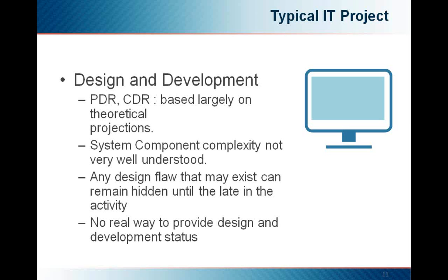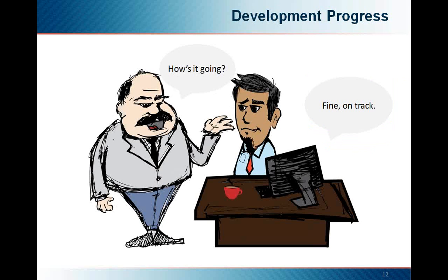The technical issues that might affect the entire overall design usually will surface after most of the coding is already complete, say maybe during system integration, and could lead to a very large rework effort. Again, since the completion time frame has already been established, managers rely on subjective estimates from the developers to determine the progress. So in reality, the coder really doesn't know how long a task will be until it's done.